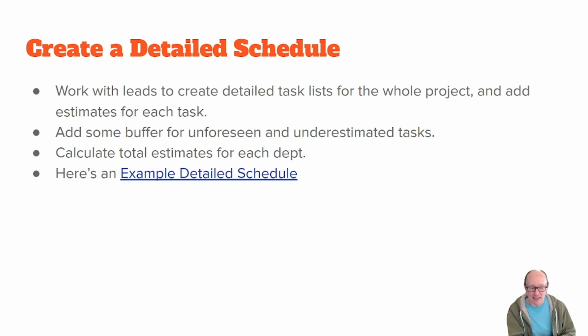Things happen. And typically they happen in a bad way, as in, there's no way that my 15-minute trip is suddenly going to become 5 minutes. However, could it become an hour because I got a puncture? Yes, it could. So often estimates tend to be optimistic, thinking that the best is going to happen, and when reality strikes, you tend to be longer than you are shorter. That's just how things tend to go. So we have a buffer to account for these things that we forgot and things that we underestimated.